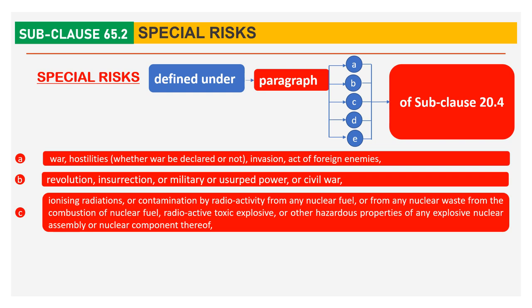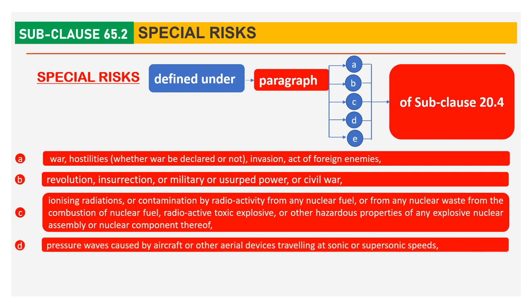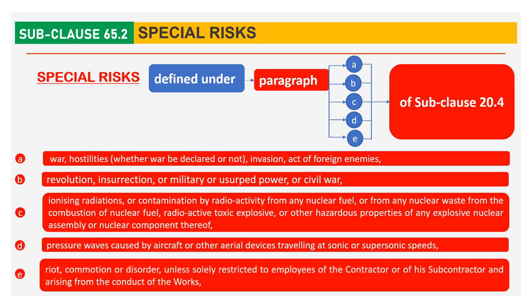Risk C: Ionization, Radiation, Contamination by Radioactivity and other like risks. Risk D: Pressure waves caused by aircraft or other aerial devices traveling at sonic or supersonic speeds. Risk E: Riots, Commotion or Disorder, unless solely restricted to employees of the contractor or of his sub-contractors and arising from the conduct of the works.